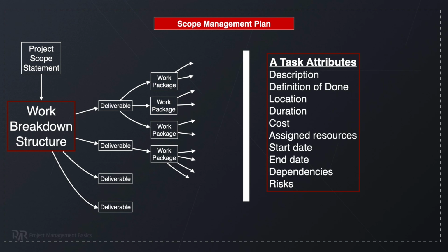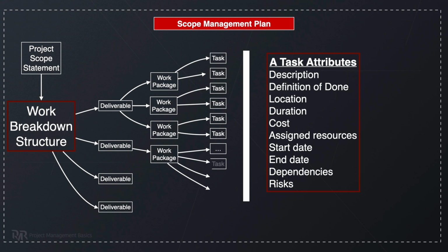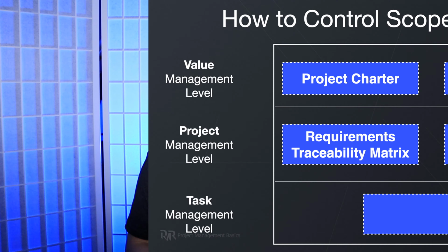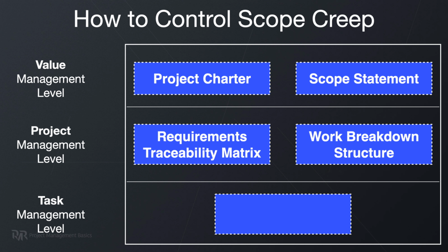And again, the idea is similar. You need to break down the project into smaller pieces. Then you need to break these pieces into tasks and activities. So now you need to ensure that you identify all the tasks required to create one such piece of the project. So, as I said, if you don't have other measures, you can control the project scope only by ensuring that no new tasks appear during the execution.